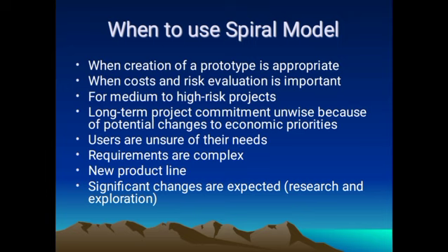When creation of a prototype is appropriate, when cost and risk evaluation is important, for medium to high risk projects. Long term project commitment unwise because of potential changes to economic priorities. Users are unsure of their needs, requirements are complex, new product line, significant changes are expected.